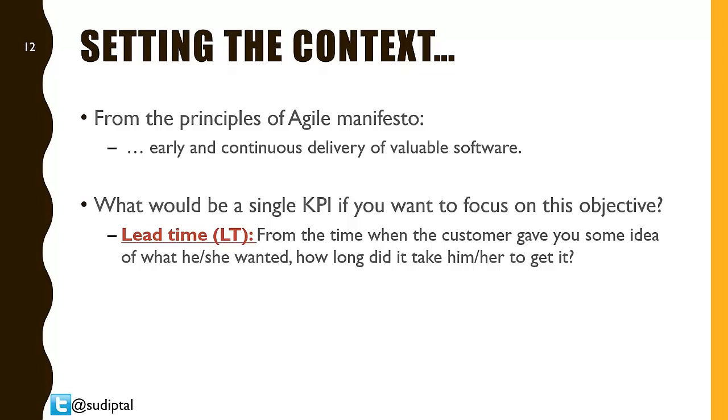Lead time is the only metric that actually tracks the time from when the requirement or the request came to the IT side from the business and when it finally got delivered. So that entire cycle time is what you would focus on when you're delivering work to your customers.